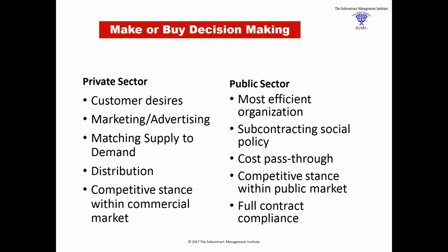But most importantly, in the public sector, is the issue of full contract compliance. And there are so many pitfalls here. We're going to have some other webinars through the year that talk about some of these points, but some of them include the idea that you have a set of flow downs that have to go to the sub. This is handled very poorly by most primes, and we'll emphasize over and over that clauses cost.